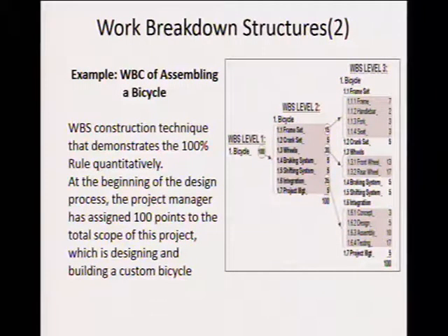So what this tool actually does is break down the activity into smaller activities. So you have the major activity and minor activity, or you have the main activity and you break down each main activity into smaller activities. And this is a tool that you can use in order for you then to build. For example, if one of the components is the foundation, what does the foundation of the house consist of? It's cement, water, concrete, all of these things. So this tool helps you then to break down the activity.